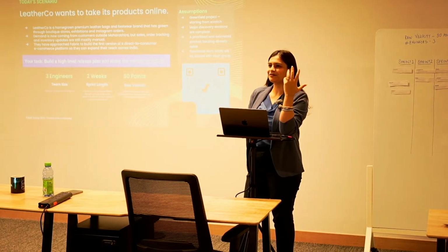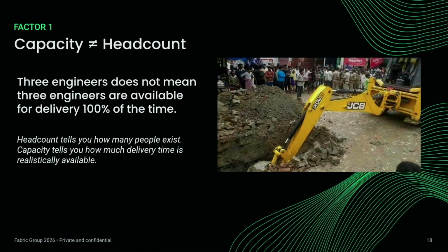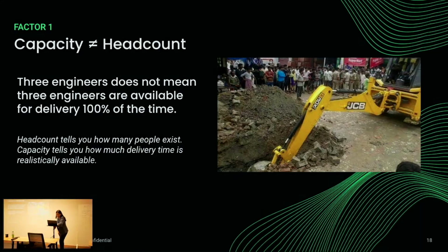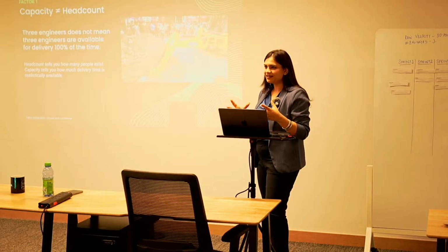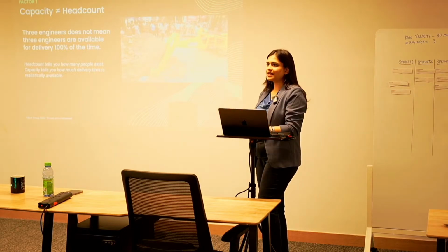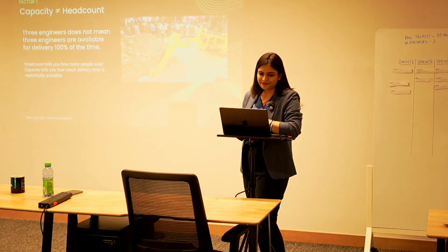So I'd like to go about introducing the first factor, which is, as the image explains, capacity does not necessarily equal head count. If you have 3 engineers, it does not mean that they are all going to be able to give the capacity which we have planned for, which is the max. So 3 engineers' time is not going to be available starting day 1. That's something which is quite important to understand.